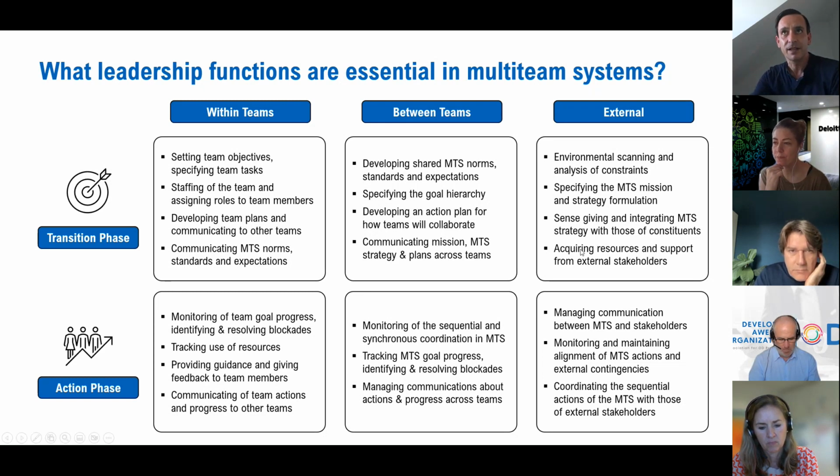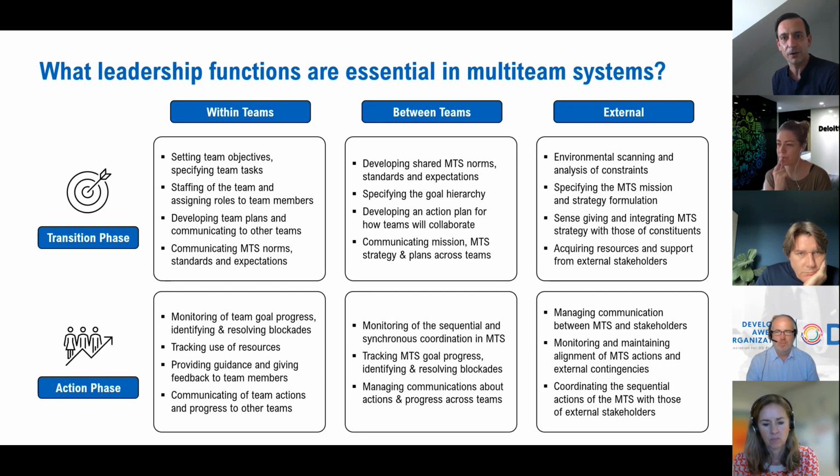Going to the second level, when you have established your multi-team system, there's a bunch of teams there. What you should do in the beginning is develop shared norms, standards, and expectations. So in an ideal world, you start with a good kickoff with all the component teams and all the members and the leaders of the component teams, where we define: this is the way of working. This is the software we use to support our working. Do we use Teams, Zoom? Where do we store our documents? Is it on a SharePoint? Is it in Microsoft Teams? Are there specific formats we use? Do we have templates? Everything that is needed in order to synchronize the work of the different component teams.